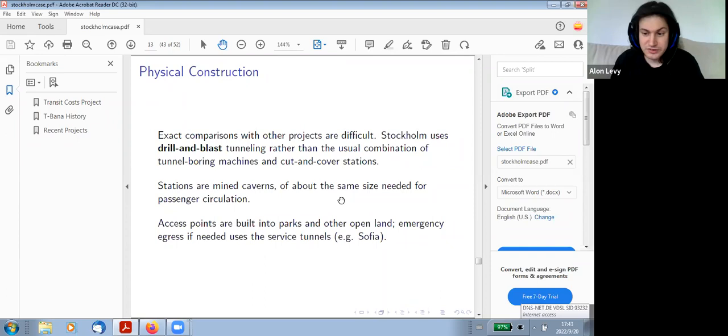I'm talking about Neo-Tunnelbahn, but I will also say that the mining for city Bahnen is kind of unavoidable for city center tunnels. This is why, again, they tend to be more expensive than metros per kilometer. But the mining seems, I won't say minimalistic, I don't mean it's brutalist architecture with no features to it. No, the stations are pretty artistic. What I mean is that they don't seem to build more than they have to. The station digs are very close to just the length of the train platform. You don't dig what you don't need to.